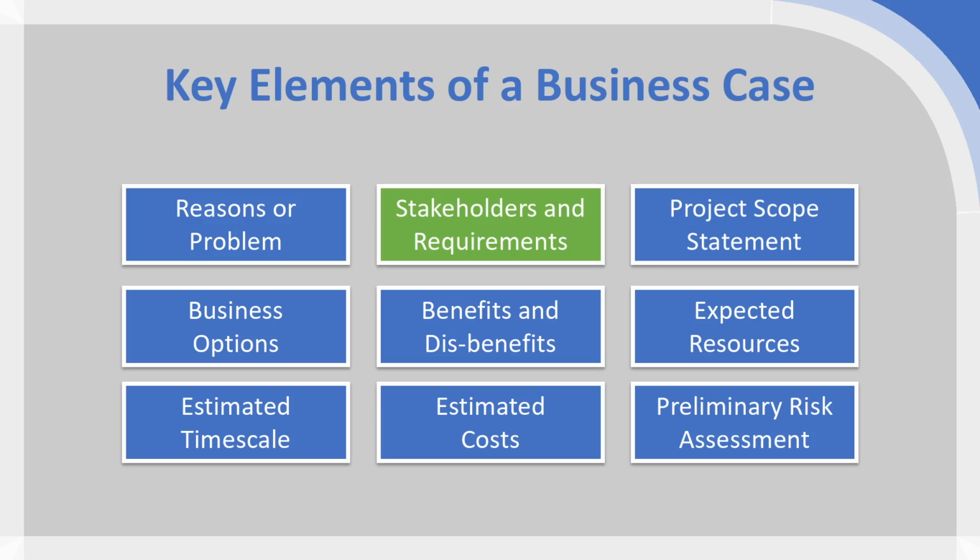One group of stakeholders may have a particular set of requirements, and it may actually conflict with a different set of stakeholders. So we need to identify all of the stakeholders who will be affected and what they would want to see from a solution. So we're not really just going straight on to our solution. We've identified the problem, but we want to consider all of the stakeholders and what their requirements may be before we start rushing to identify a particular solution to our problem.